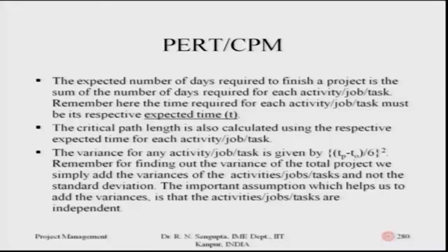The expected number of days required to finish a project is the sum of the number of days for each and every activity on the critical path. Remember, the time required for each activity must be respected to the expected time, considering it is a PERT method, and for the CPM method it is the time as given. The critical path length is also calculated using the respective expected time of each activity.